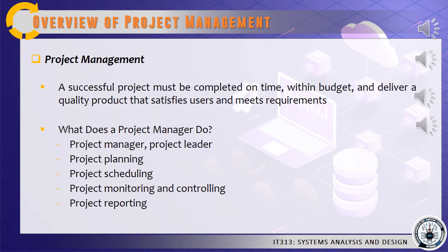For example, if an extremely time-critical project starts to slip, the project manager might have to trim some features, seek approval for a budget increase, simplify the testing plan, or a combination of all three actions.